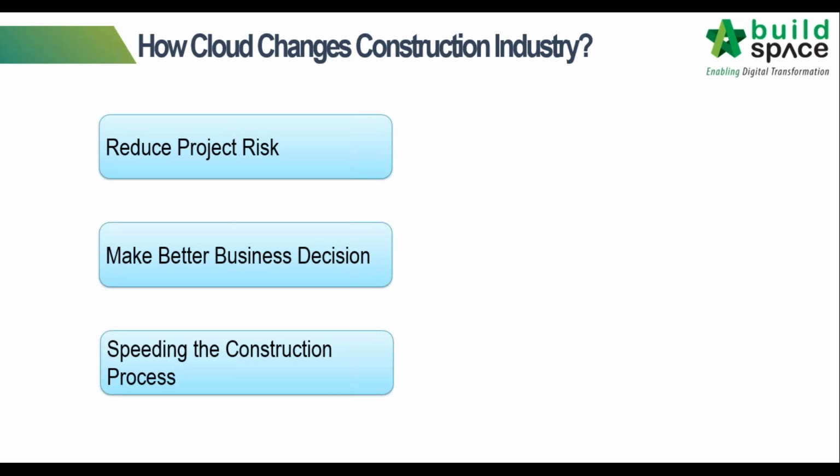required for the preparation of the tenderer comparison report during the construction tendering stage. Because what I heard from one of my friends working as a QS, usually one QS will take up almost half of the working days just to do the arithmetic errors checking for one contractor or even one tenderer. So let's imagine if we have 10 tenderers that submitted their tenders at the same time, it means that we have to spend 5 full working days for the one QS consultant just to perform all the arithmetic errors checking, which is very time consuming for a consultant QS.